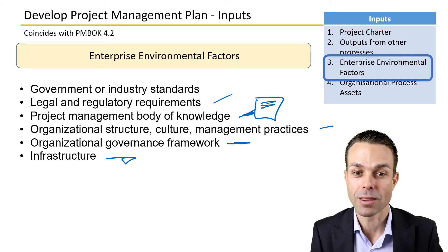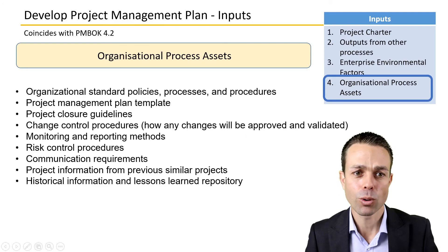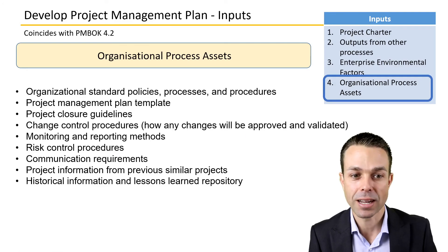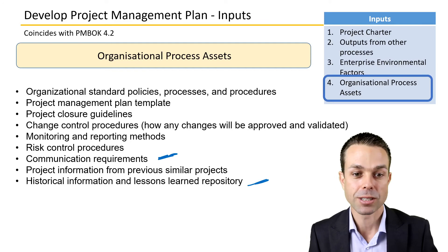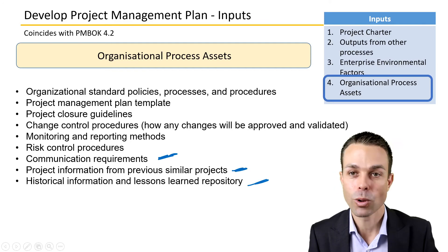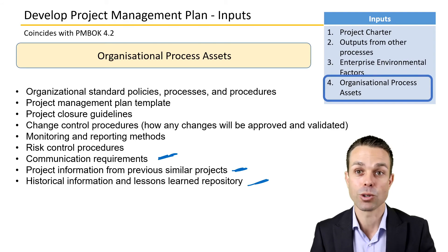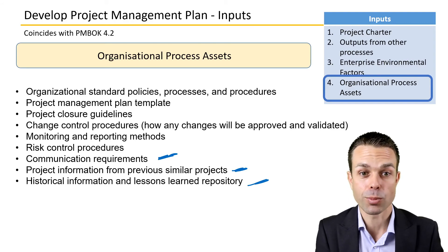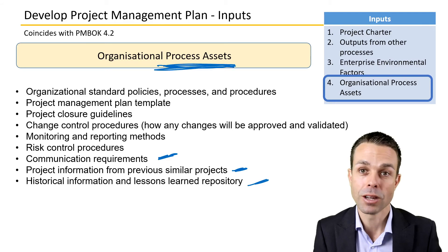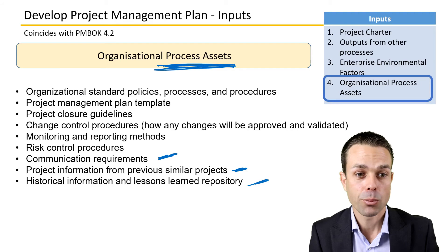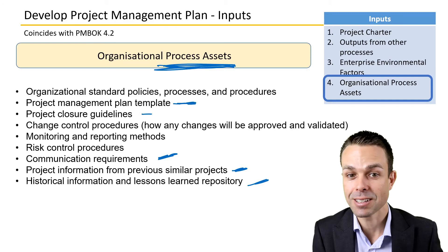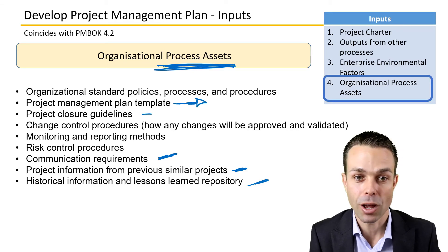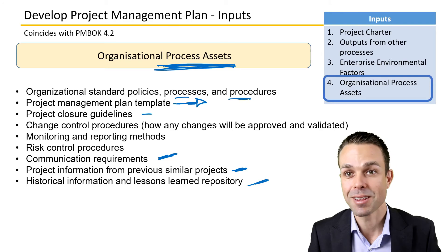The project management body of knowledge itself is a very useful enterprise environmental factor. Organizational process assets include templates, risk procedures, communication requirements, historical information, lessons learned repositories, and project information from previous similar projects. Gathering these process assets is really helpful. There may also be project closure guidelines and existing project management plan templates within an organization.